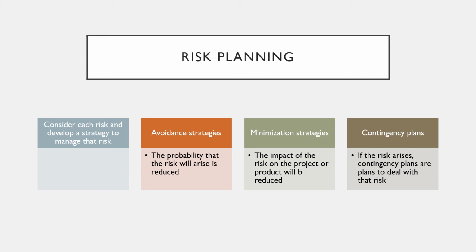The risk planning process develops strategies to manage the key risks that threaten the project. For each risk, you have to think of actions that you might take to minimize the disruption to the project if the problem identified in the risk occurs. You should also think about the information that you need to collect while monitoring the project so that emerging problems can be detected before they become serious.